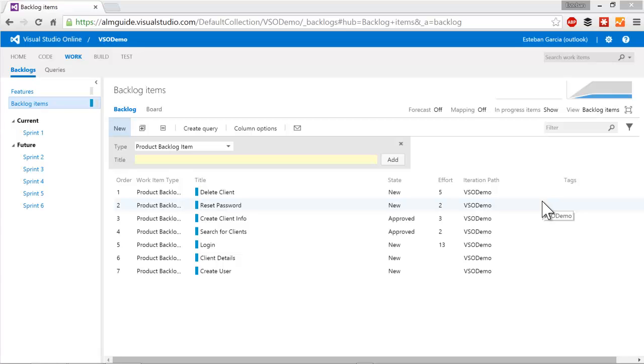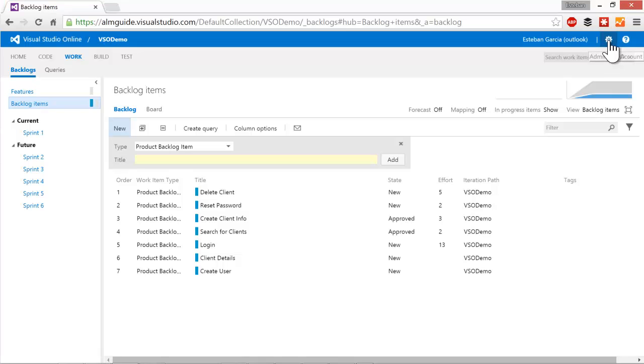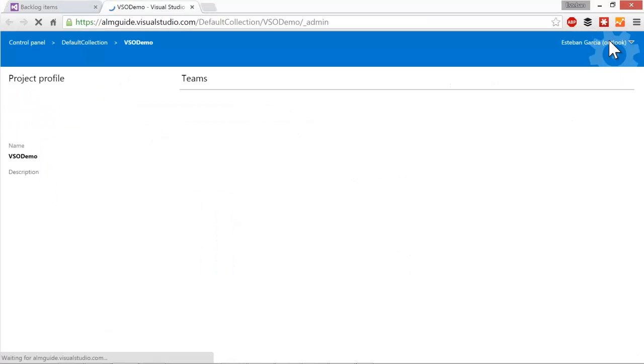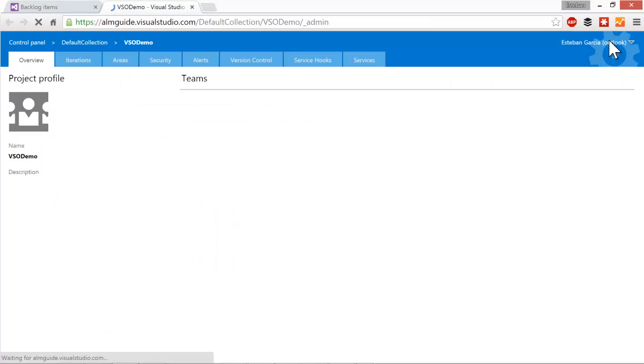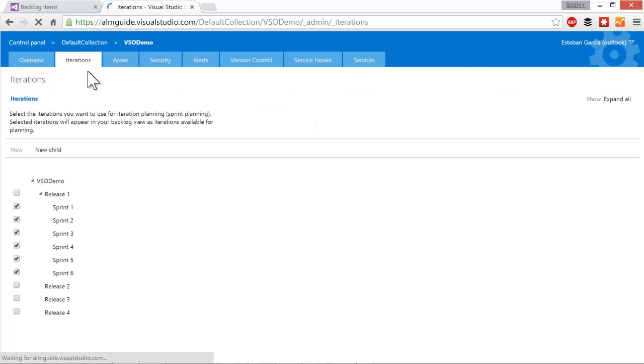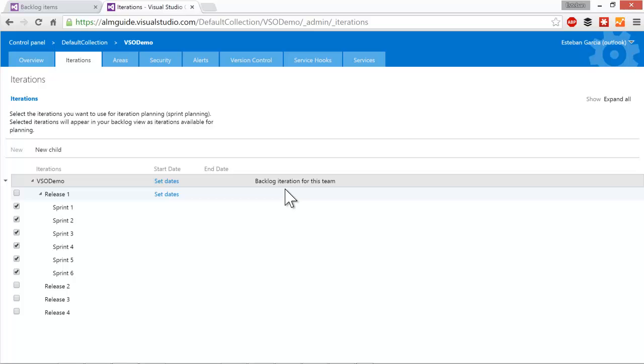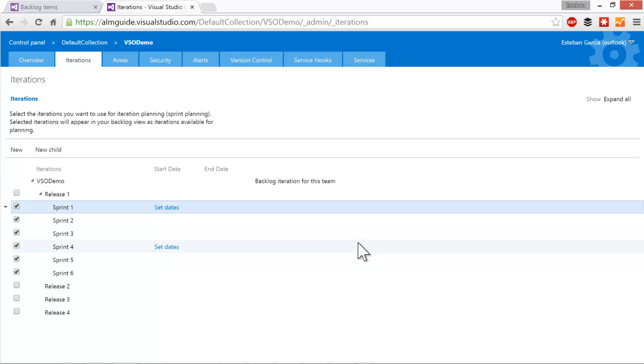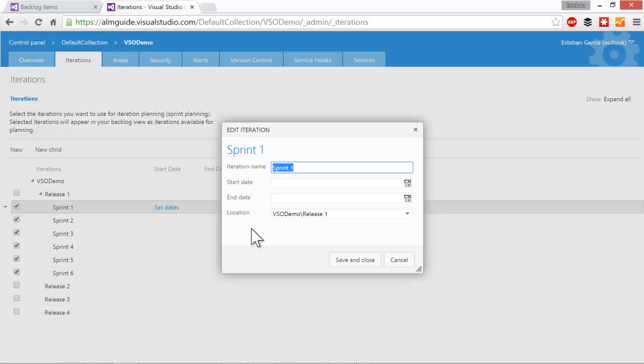To configure your sprints, you're going to click on the gear on the top right in Visual Studio Online that will take you to administer your account. From there, you can click on the Iterations tab and this is where you can set up all your different iterations. You can do things such as set your dates. For example, first we want to set up our sprint one. So clicking on the set dates link brings up this dialog.